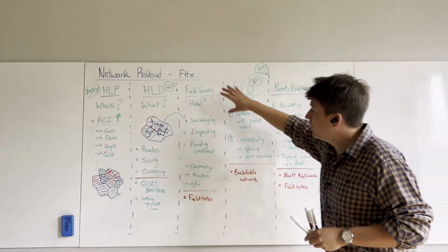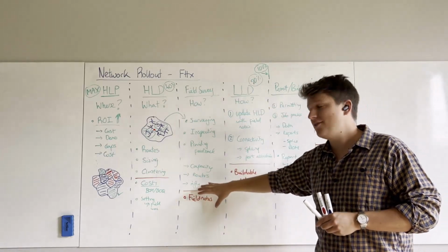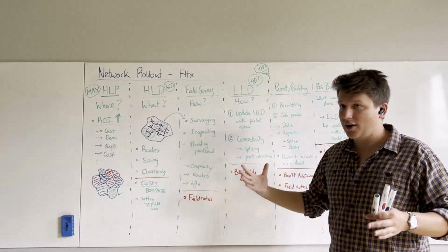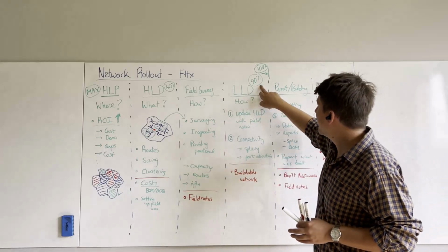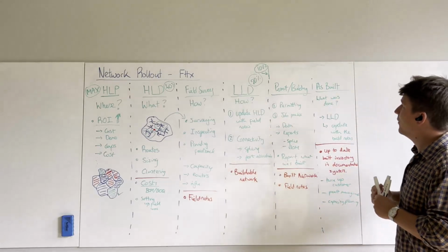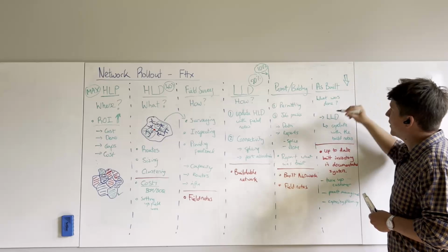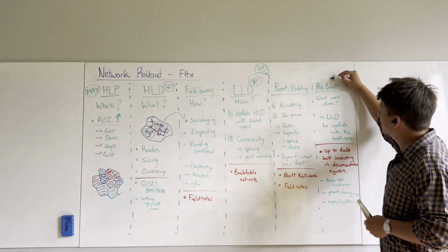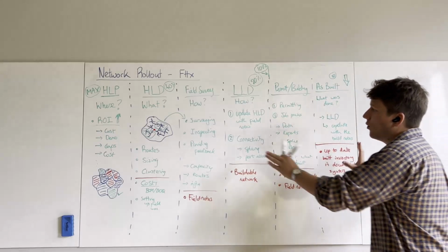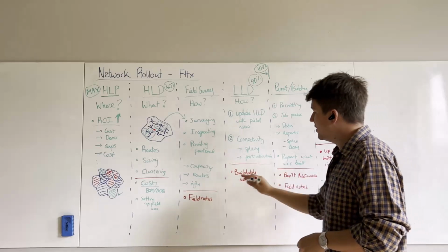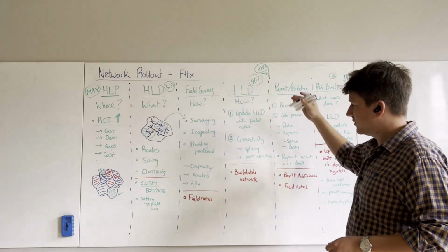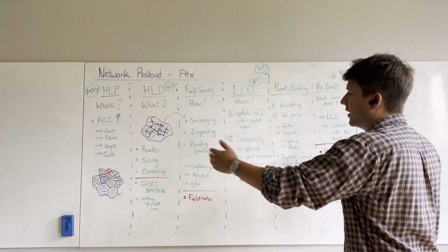If you're updating just field survey, you don't just see the benefits there. If we can improve field survey, not just in terms of time and effort, but if that gets this number higher, that means building and permitting is easier, and it means the as-built comes down in effort. Because if this is 90%, we're now only updating 10% of the records. If it was 80, we're updating 20% of the records, right? So it's all interconnected with one another, and streamlining and improving processes in each of these phases has knock-on impacts elsewhere.